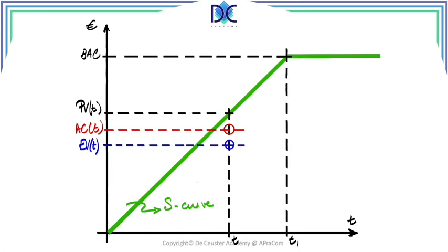We can see the relative position of EV to the PV. Here we see we created less value than we planned, so we're clearly behind schedule. And we also see that the cost to create that value is higher than we estimated, so we are over budget and behind schedule. The first thing to do is to define the schedule variance and the SPI.